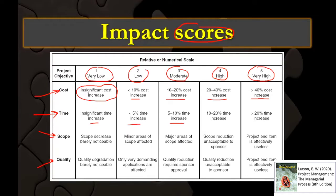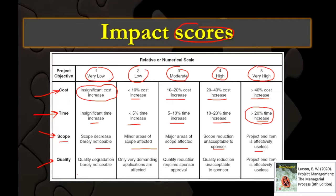The same thing applies to duration. If there's no major time change, but if you change more than 5% of the time, it's a low impact. But if you increase the activity time by more than 20%, that's a very high impact. Of course, here we're talking about things that impact the project — so we have to look at activities in the critical path, not outside of the scope. For scope and quality, the idea is the same: two types of score moving from low to high.